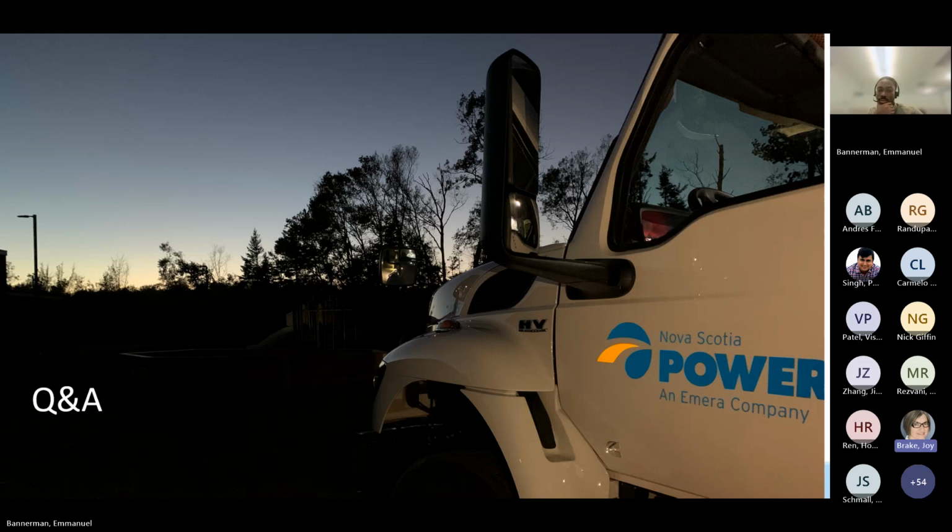Getting it up front, you're not getting connected in Nova Scotia anymore if you don't give it to us. Basically, we have a queue position to get an SIS. A milestone to get an SIS study is that you get models that pass our model quality test. That you just don't get in there. So if you don't get the information up front, it's a no-go. And then in future, put it into the contracts with them.